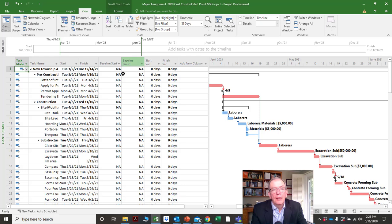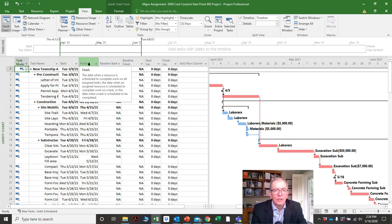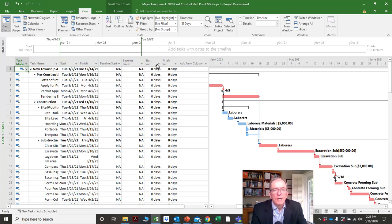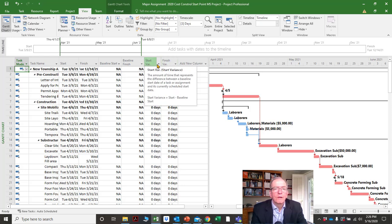Which brings up the next most important screen — the variance screen. This would be filled in with my baseline dates once I set the baseline, because Microsoft Project takes a snapshot of the plan and puts it there. When the plan changes, it compares the changes to the original plan.